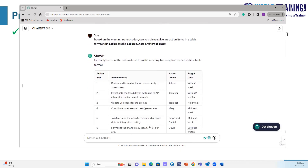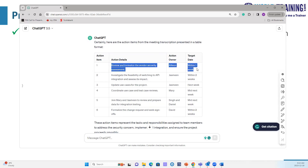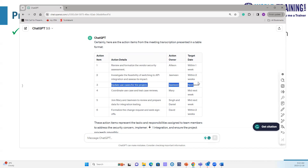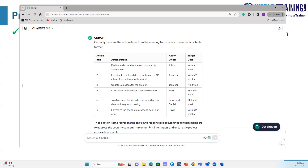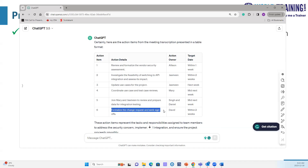This table format makes it easier for us as a project manager to follow up. You can see that six actions were agreed in the meeting: review and formalize vendor security assessment within one week; investigate feasibility of switching to API — Jasmine; update use cases next week — Jasmine; coordinate use case and test case review by mid next week — Mary; join Mary and Jasmine for data integration prep — Singh and Daniel; formalize change request and get sign-off within two weeks — David.